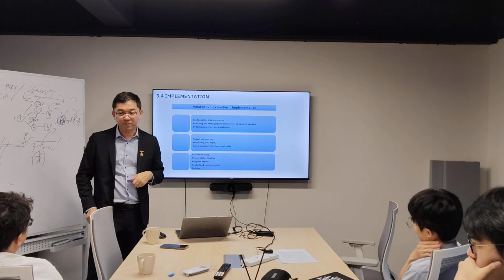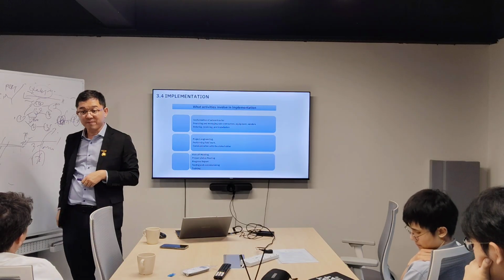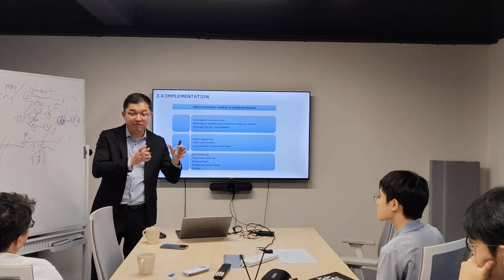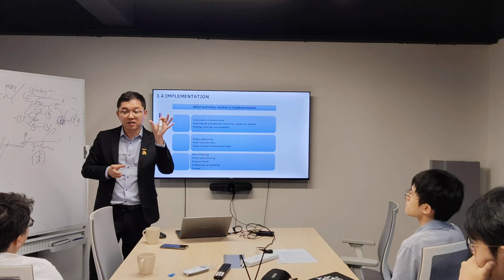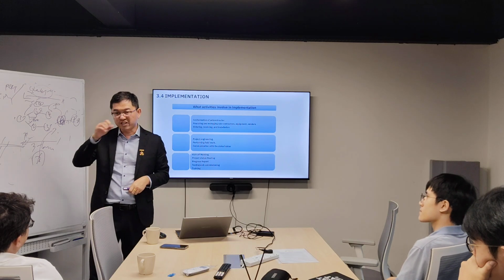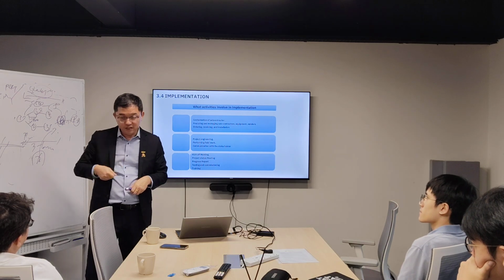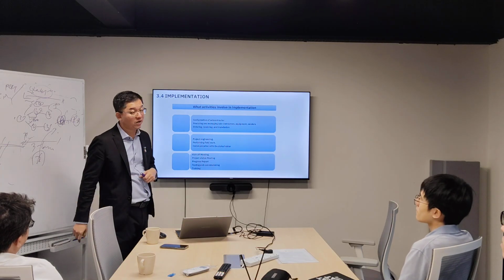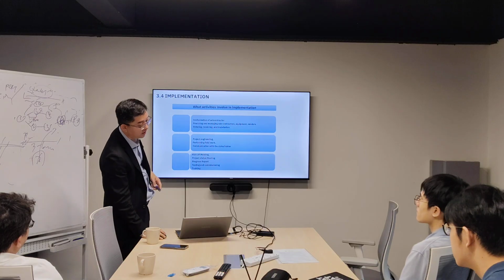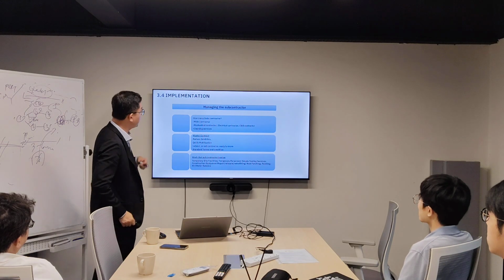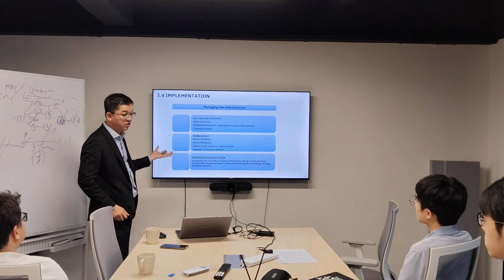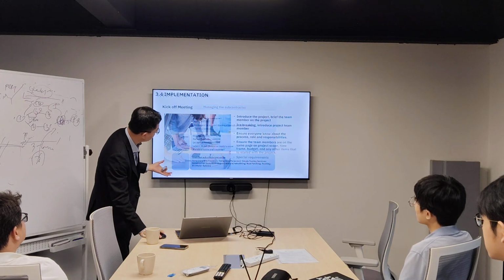Because by law, all the construction workers, if he is a bricklayer, he needs to have the CIDB training certificate. If he is a welder, he needs to have the welding certificate. He needs to be qualified to become a welder. So these are the training that we will ensure they do during implementation. So these are the things we do in managing the subcontractor. Okay.